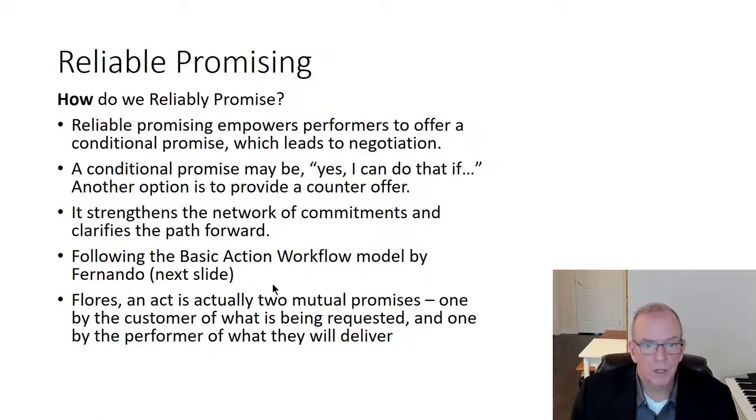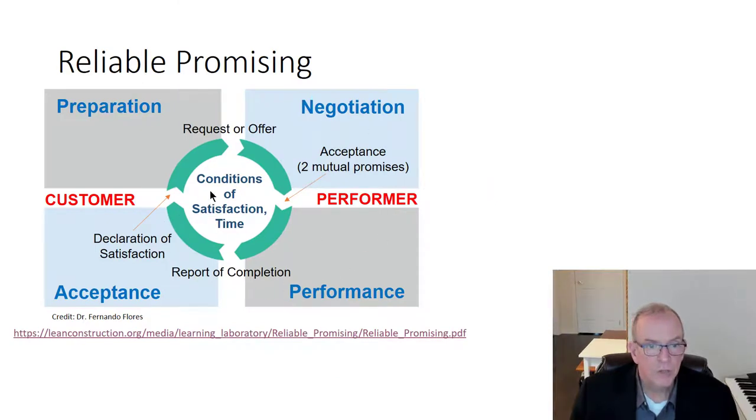And it was based on a model. You can sort of Google this by Dr. Fernando Flores. Flores really brought in this model that identifies the process to get the conditions of satisfaction and time that's needed to successfully perform work in complex projects, which are construction. Negotiation. So both sides should have that ability to ask questions, to clarify, to say no or to say yes, or what conditions they need to be able to actually perform the work, to make sure that it's accepted by the customer receiving the work.